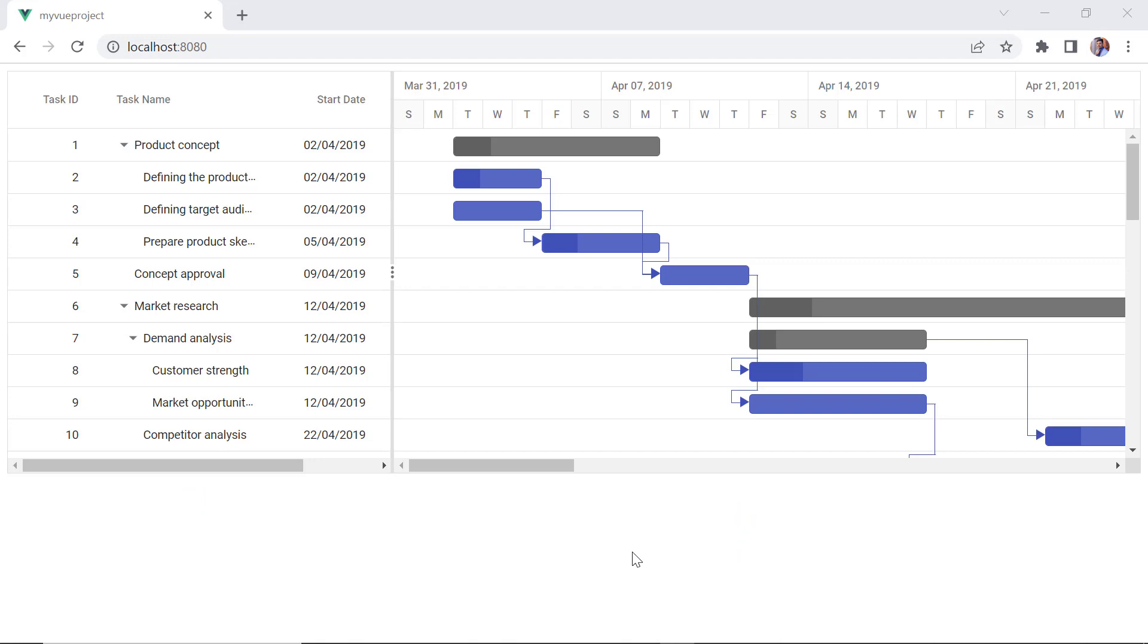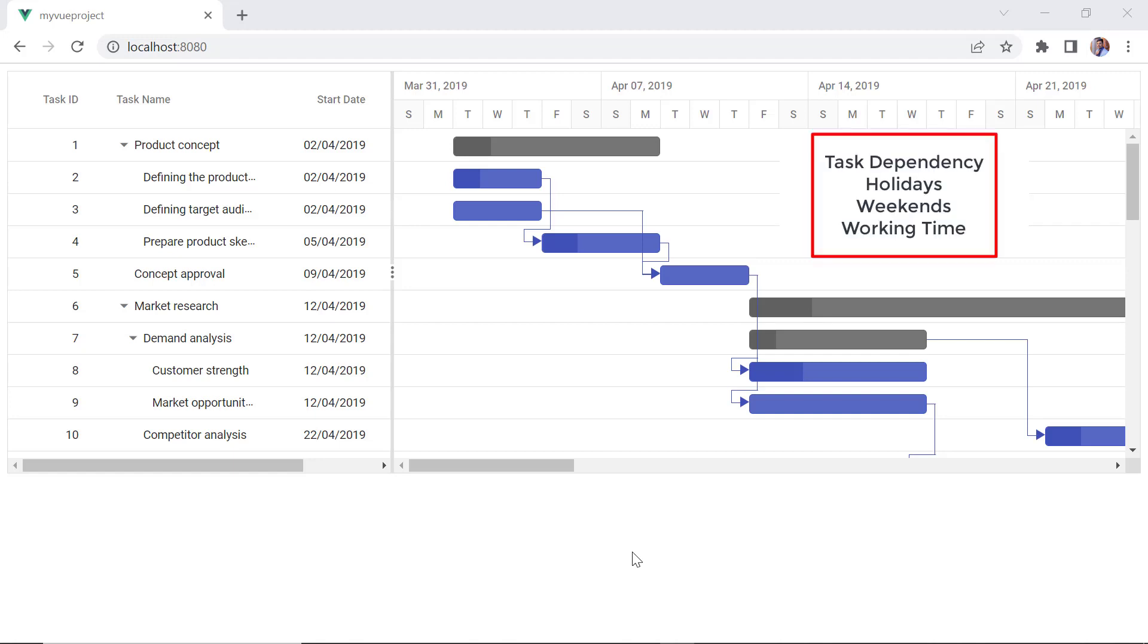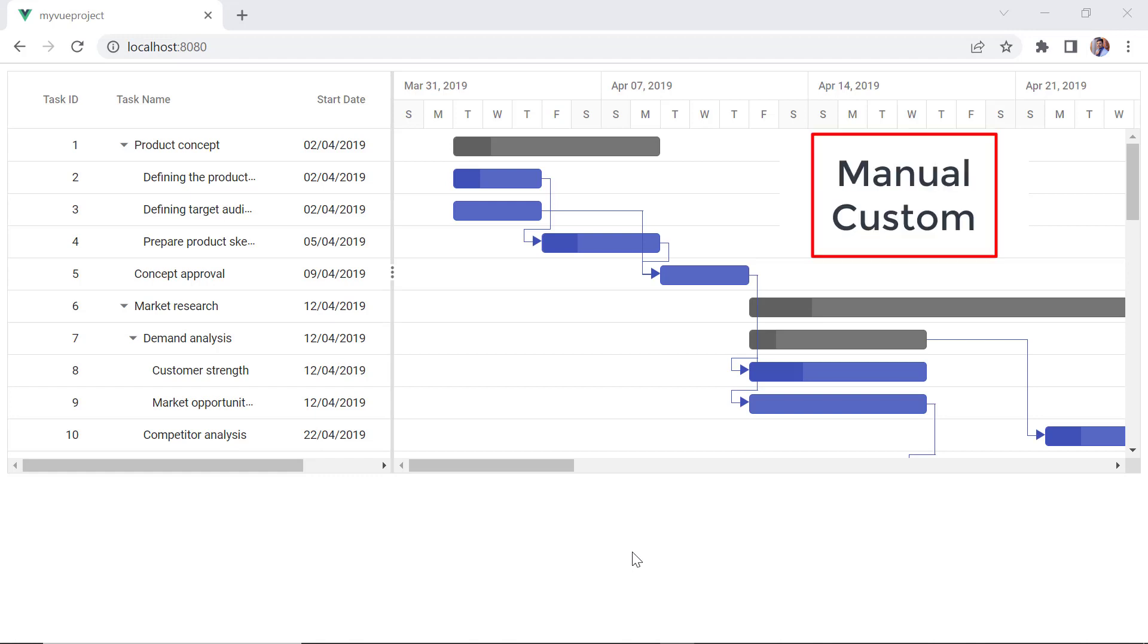Now, I'll show you how to validate the start and end dates of a task scheduled in the Gantt chart. By default, the scheduling mode is set to auto, which validates the dates automatically based on various factors such as dependencies between tasks, holidays, weekends, and working time. The other modes are manual and custom.